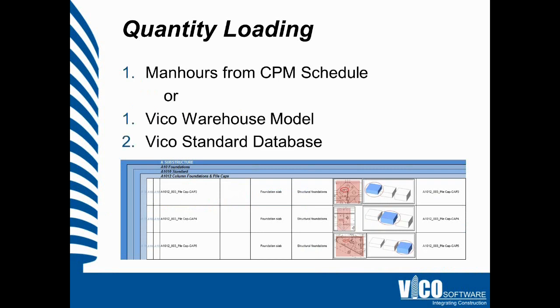So if you happen to have a model available and a database, most of the work for quantity loading is actually done for you already. And in my experience, that's one of the primary reasons why resource loading and quantity loading schedules are so rare in the industry. It's just a lot of work.